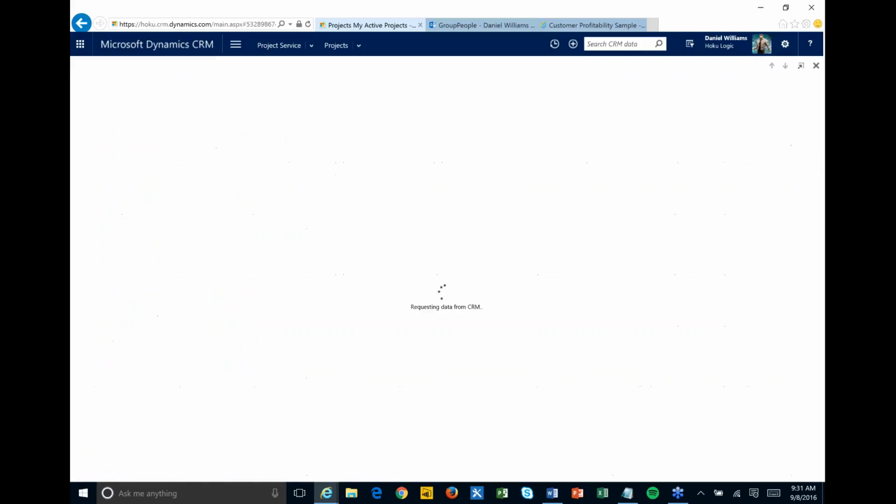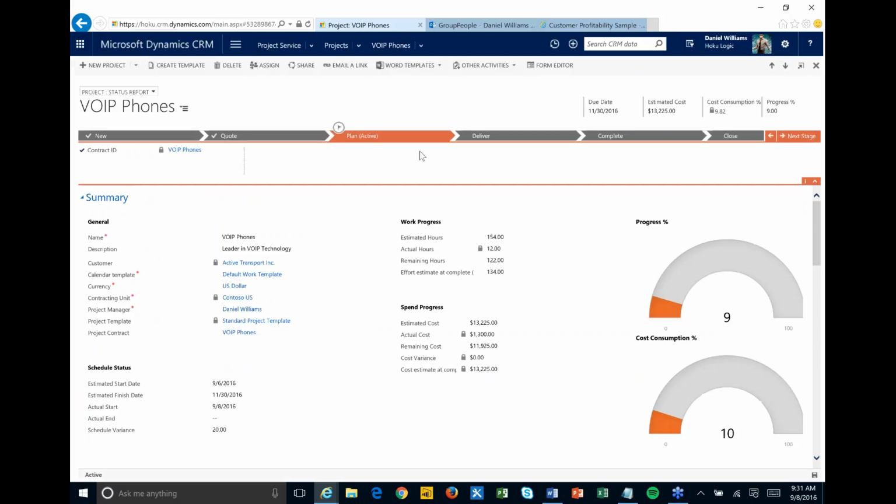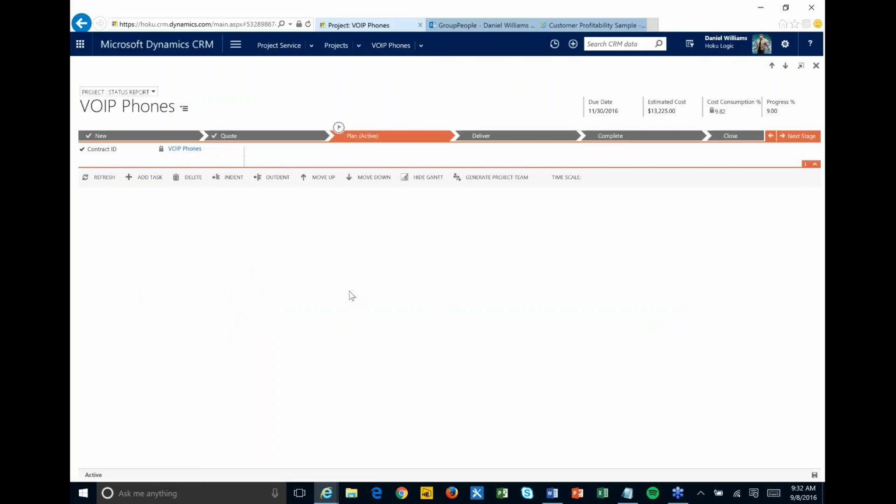So I'm going to click on this guy, and now that that project's been won, one of the very first things that I might do is make sure that I'm getting my resources for my project. That's one of the very first things we need to do, right? Make sure that we're getting the right resources to work on this project with the right skills and so on and so forth. When this project's created based off of the project type, you can actually utilize a template to automatically build out your plan for you.